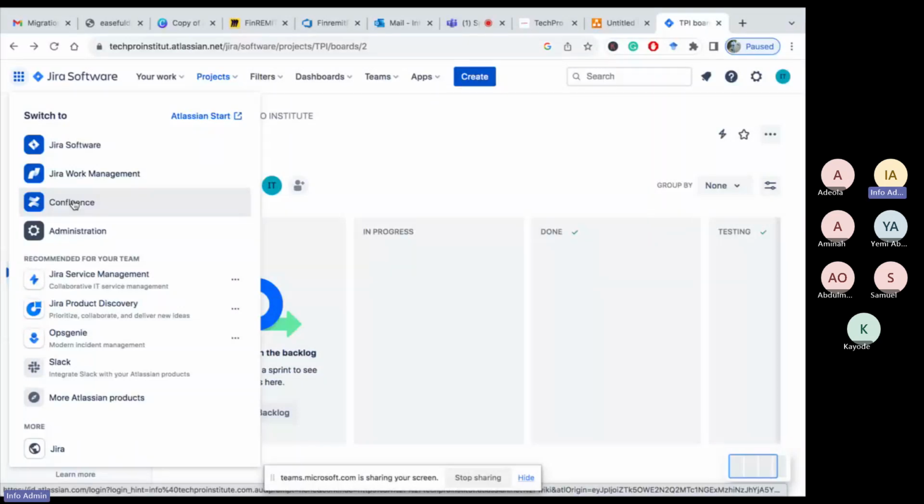When you create a project, you create a ticket where you write user stories and acceptance criteria, using Jira software. The moment you finish writing it, as a business analyst, with your user stories and acceptance criteria, it's dev ready. That means you finished all your analysis and written those stories. It's ready, so you assign it to your developers.